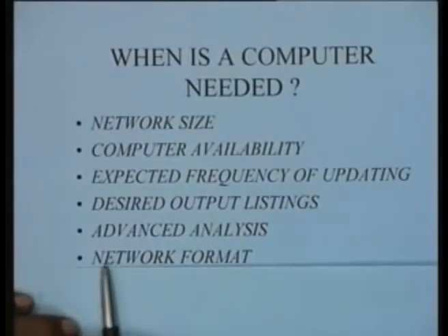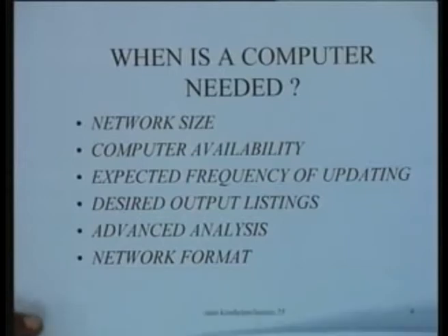By the network format we really mean whether the network is going to be in the AOA mode or in the AON mode or in the precedence diagramming mode, because different computer packages give you various options in terms of dealing with different kinds of network formats. So these are some factors which really determine whether a computer is really needed or not.